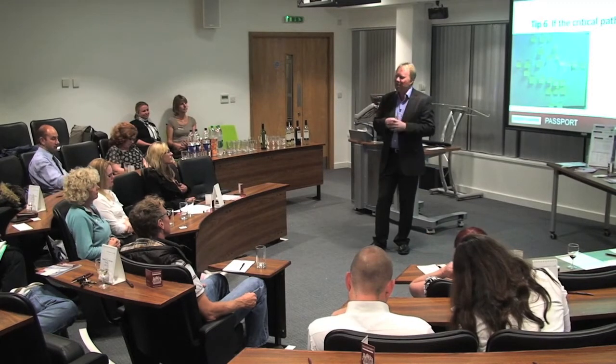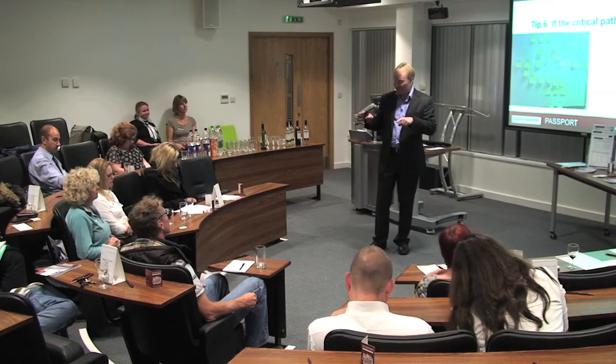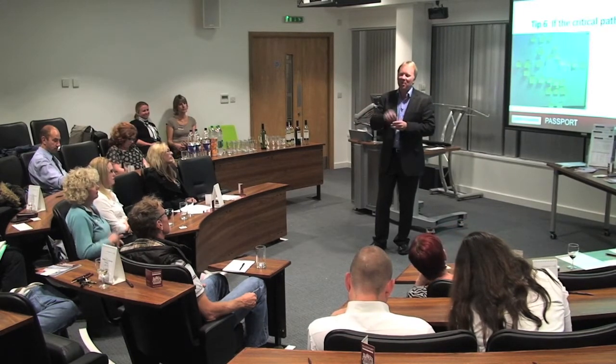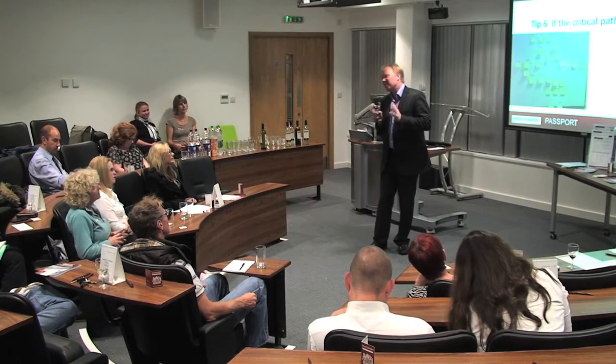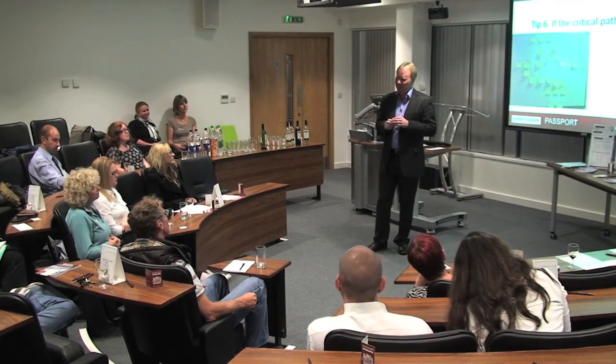And really, they're the only choices, aren't they? Because if you're trying to reduce the time, thinking about my 3 circles, really your only options are quality down or money up. Well, there is one more kind of option, which is to overlap some of the tasks.